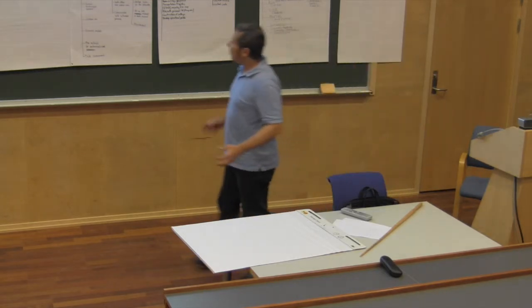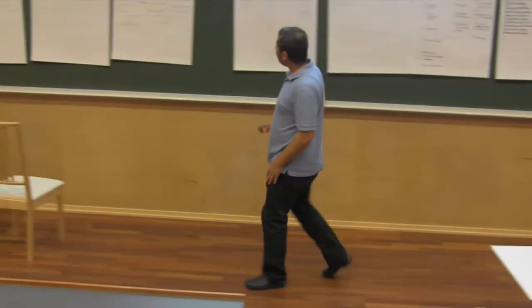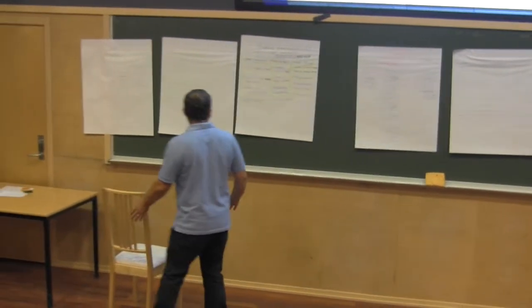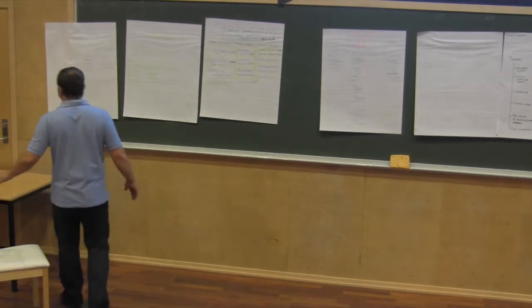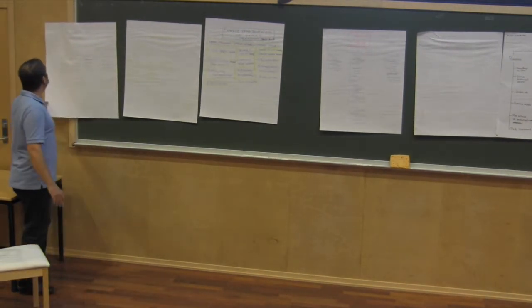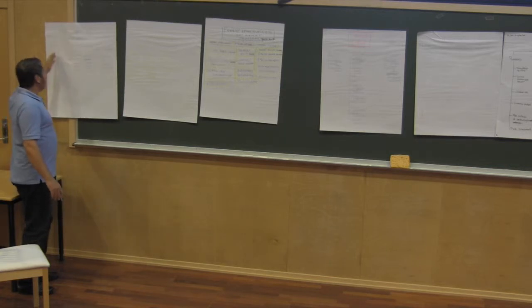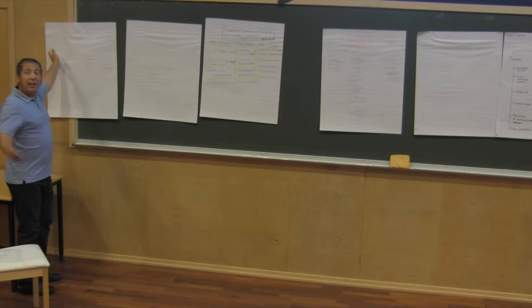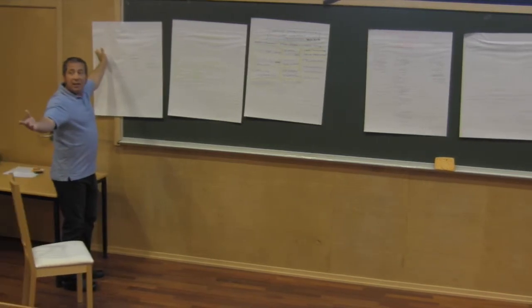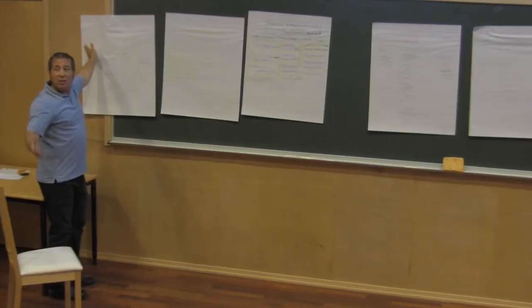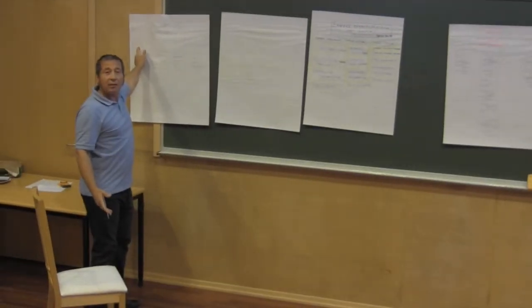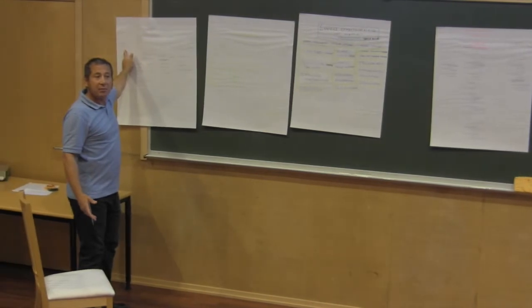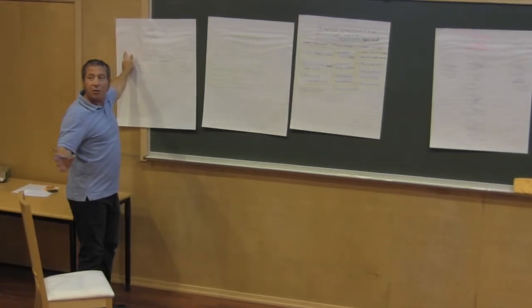Now let's look at some of the answers that you have indicated. Let's say this one here, the new snow time reporting system, R&D, research and development. In the assignment, there was nothing mentioned about research and development, right? What is that? What do we call this? Scope creep. Exactly, that's a scope creep.